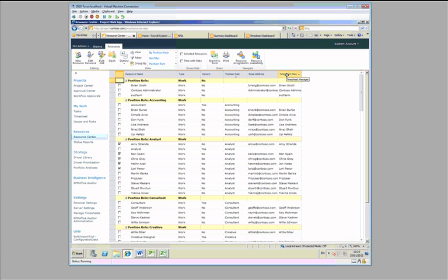Again, I might want to classify people not just by a primary role, maybe a secondary role, or a geography, or a business unit, or language, for example. We can also introduce weights to this as well. So these resources, as I see, could be costed. So I can start to track cost based on an hourly or daily rate, a material type resource, or even just standard cost type resources, IT hardware, bricks, paint, whatever sort of projects we're managing.